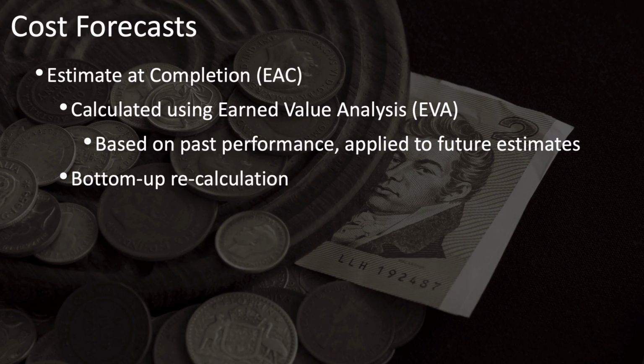We have several lessons specifically on earned value analysis. However, at a high level, it simply is based on the idea that if your project has been under budget, for example, and you expect that it will continue to be under budget, then earned value analysis will help you to quantify exactly how much under budget you think the project will be. The same for schedule. If you've been ahead of schedule, it will allow you to quantify how far ahead of schedule you believe you'll be. And it helps you to separate and manage separately your costs and your schedule, and to see clearly where a project is headed.